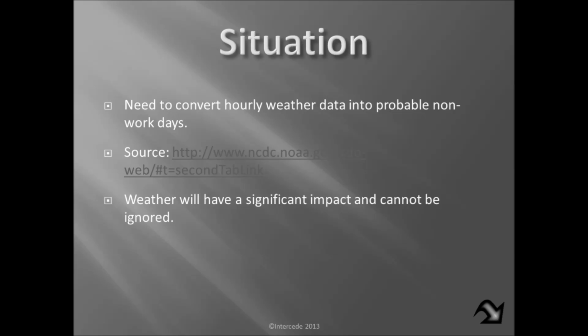One is a circle on the ground or a brick, and then the number of raindrops in a particular period of time, generally a minute. Not altogether empirical and highly subjective, actually, because it varies from superintendent to superintendent. But we had to have a point to start with, and I stayed with the 0.2 of an inch. And what we're going to do here is take this data, analyze it, the assumption being that it's normal, and I'll show you that in a little bit. I think that's a reasonable assumption, especially given the fact that we've got a 50-year period here.